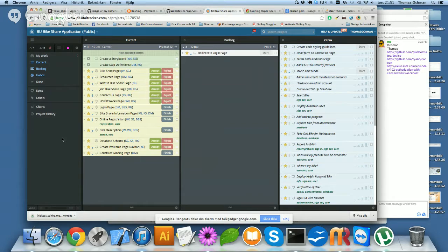And also, if I'm calling an external API or using some external resources, then of course that automatically makes it a 3-point story for me, because that needs to be tested thoroughly before you push that sort of code into production.